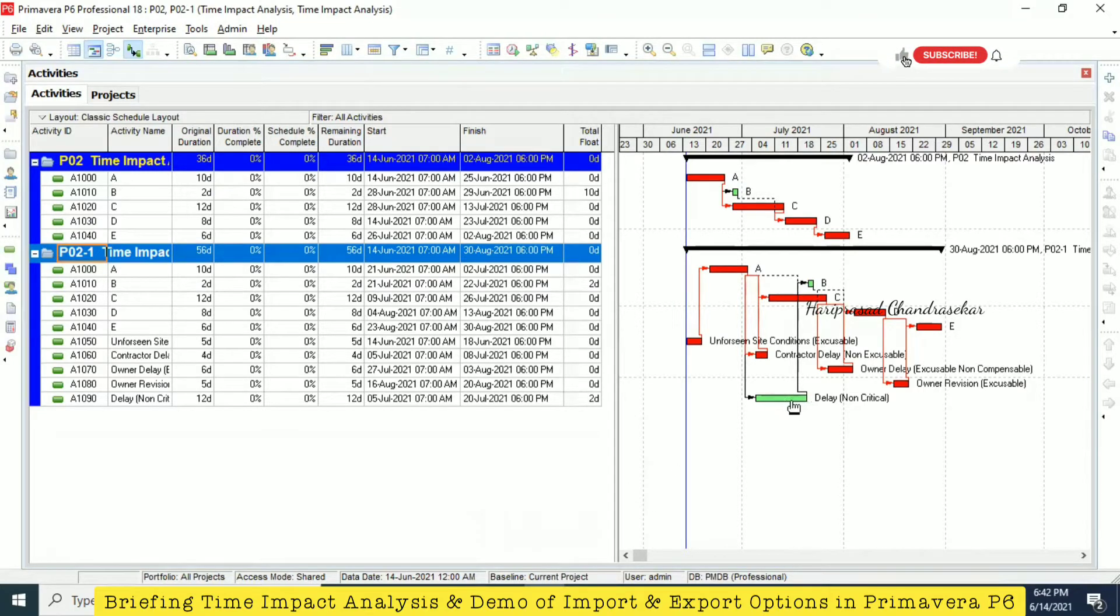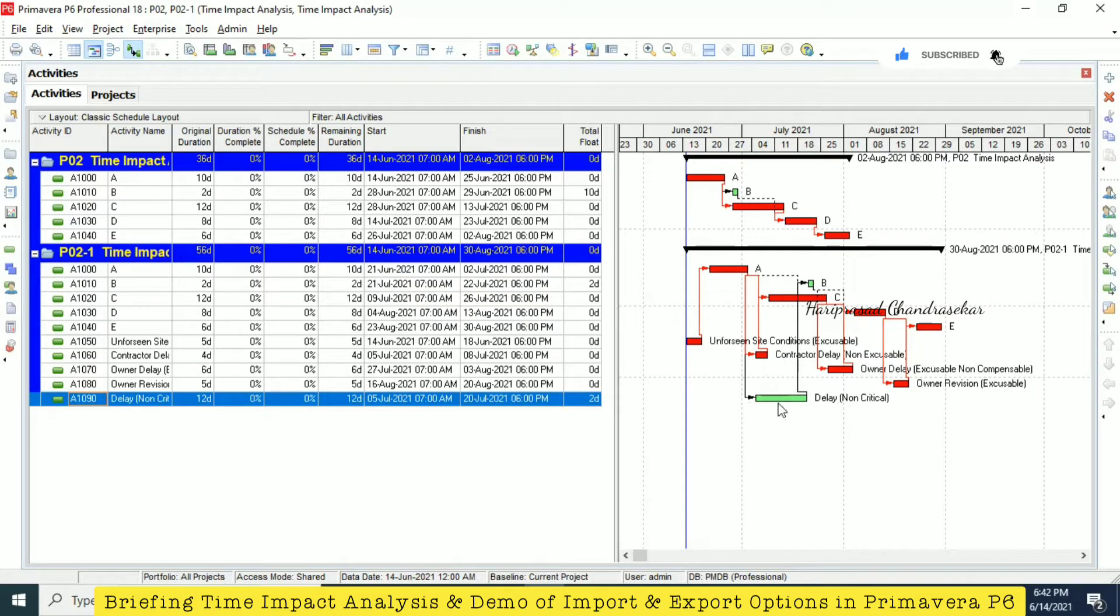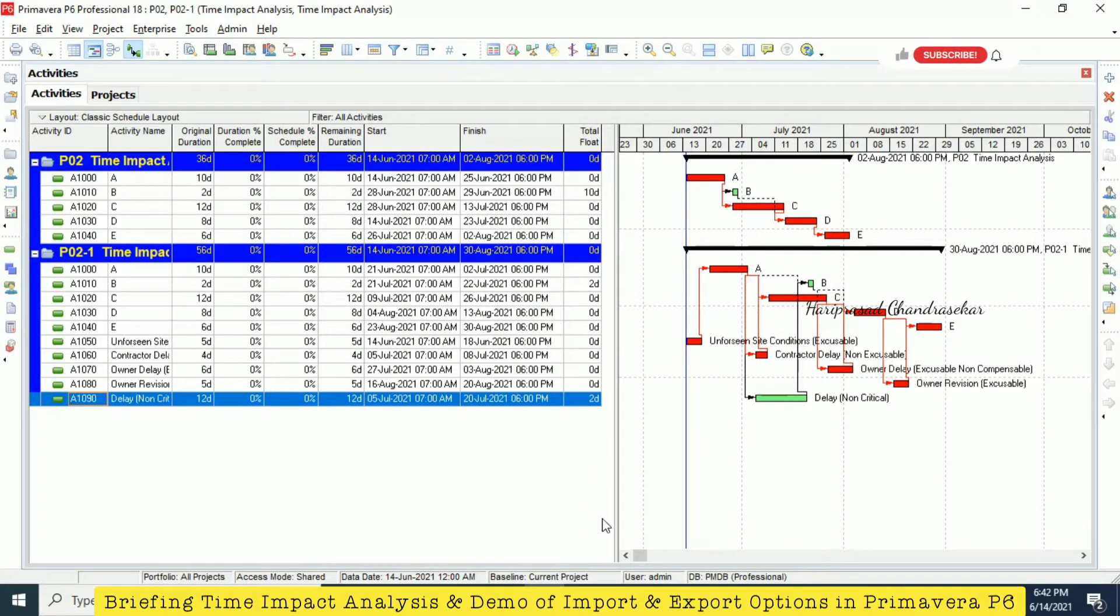This is a kind of delay, but it is not going to affect the project. We still have two days float. This no need to put any cost or any time, because it is within the float. You can compare like this.